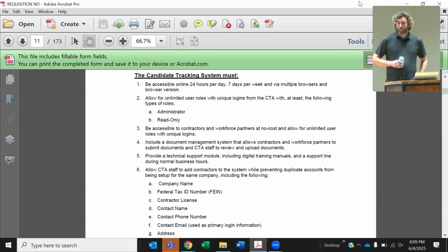about what I expected, because you think about it, you get 4 guys in a pickup, and that includes expenses to get you there, hotel and parking and fuel and per diem, plus their technician rates, probably $150 an hour, fully burdened. And then per crossing, I've done the assessments, it takes about 45 minutes to really collect the data accurately.